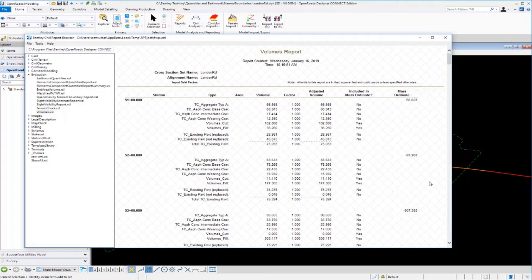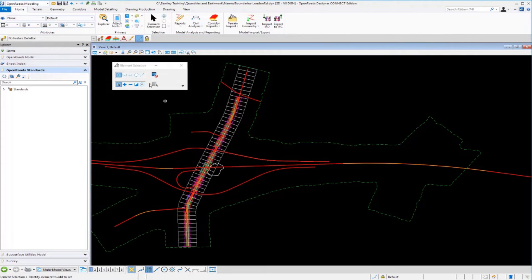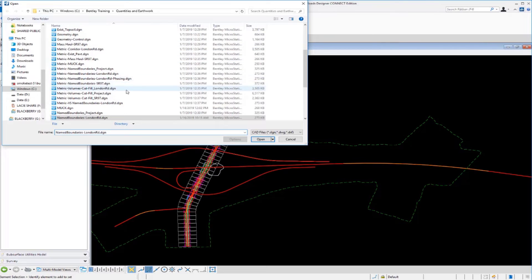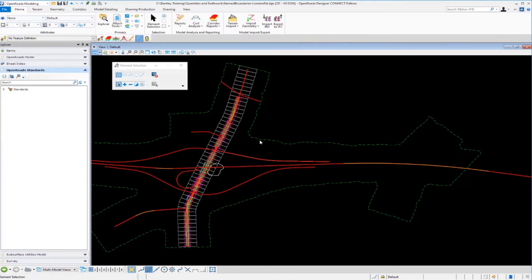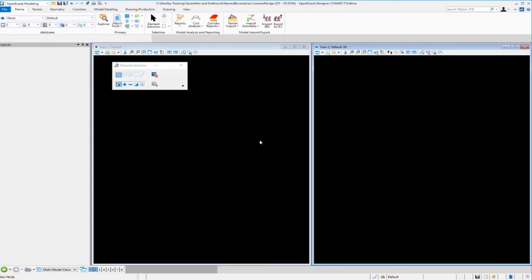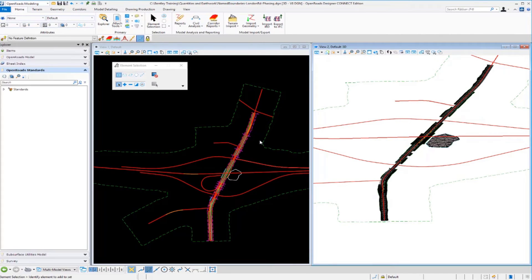Now let's look at creating additional named boundaries for construction sequencing purposes. Sometimes we need quantities just on one side of the road or different areas of the project. The next example creates named boundaries on the northbound side of the road and on the southbound side separately, to allow separation based on construction phasing or sequencing. Opening a different DGN file set up specifically for phasing and construction sequencing with named boundaries.